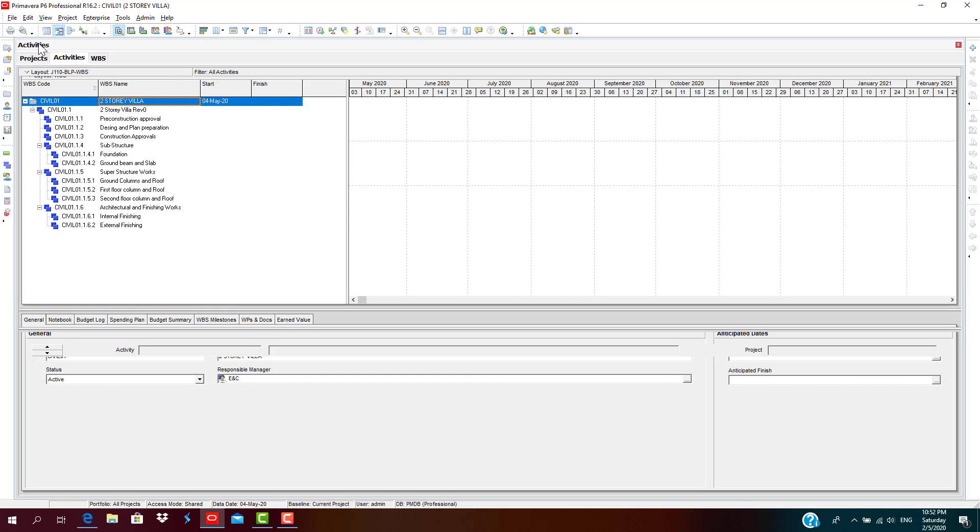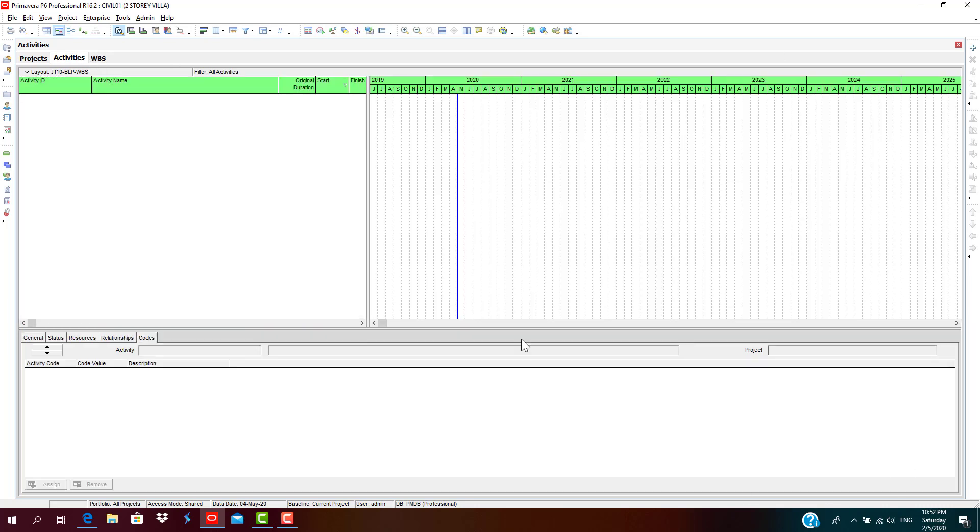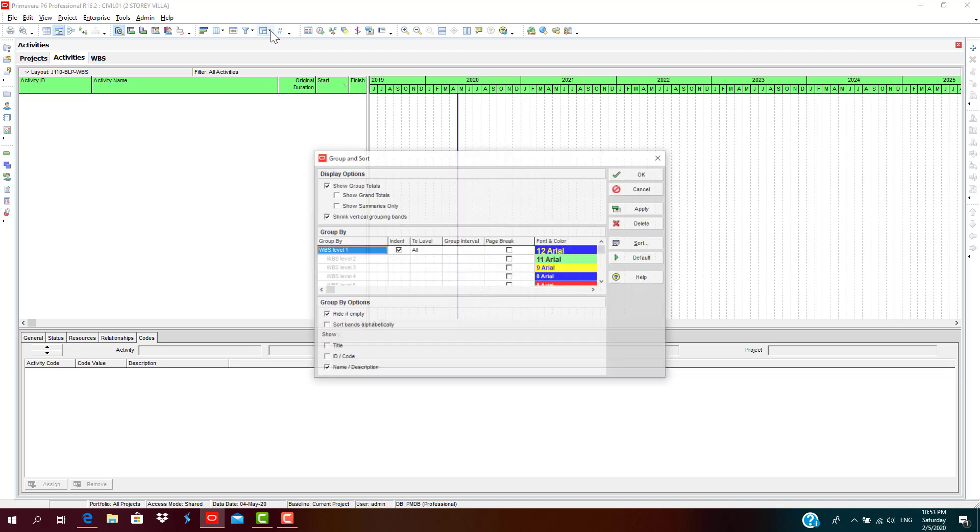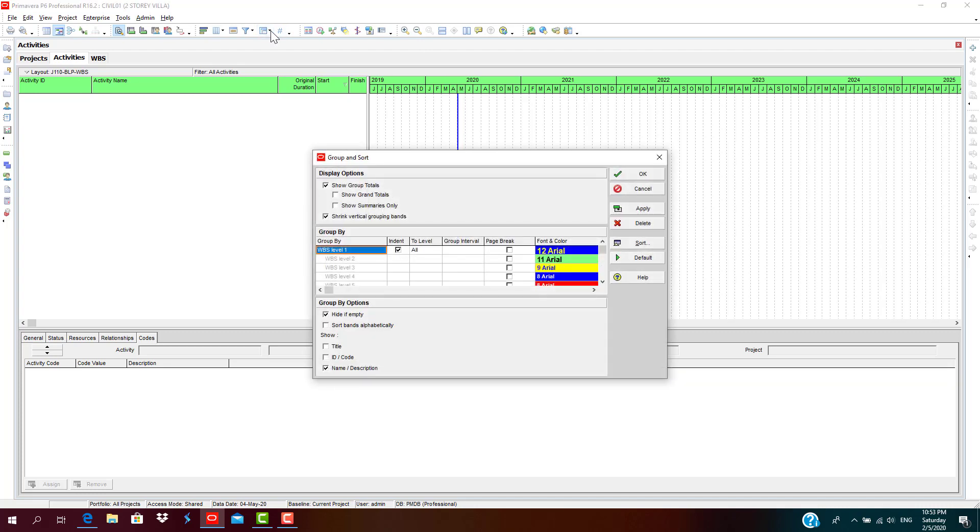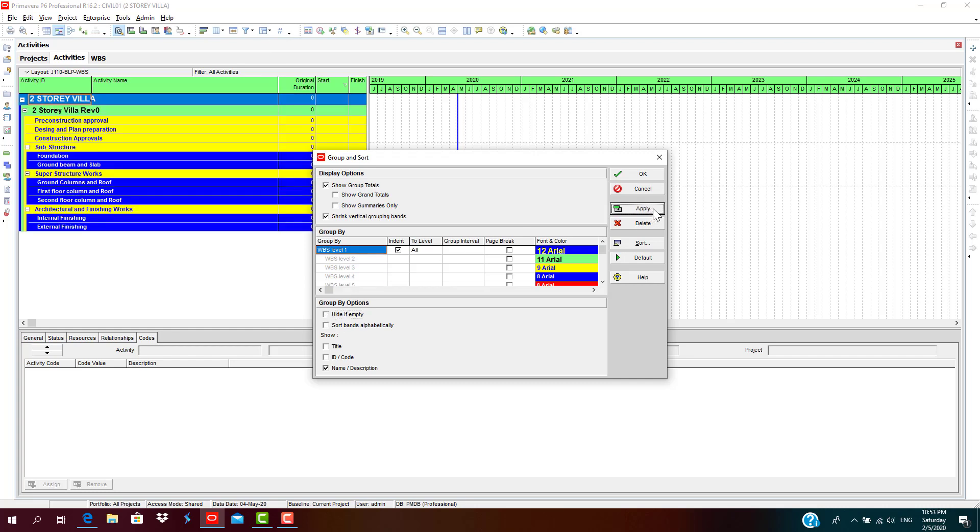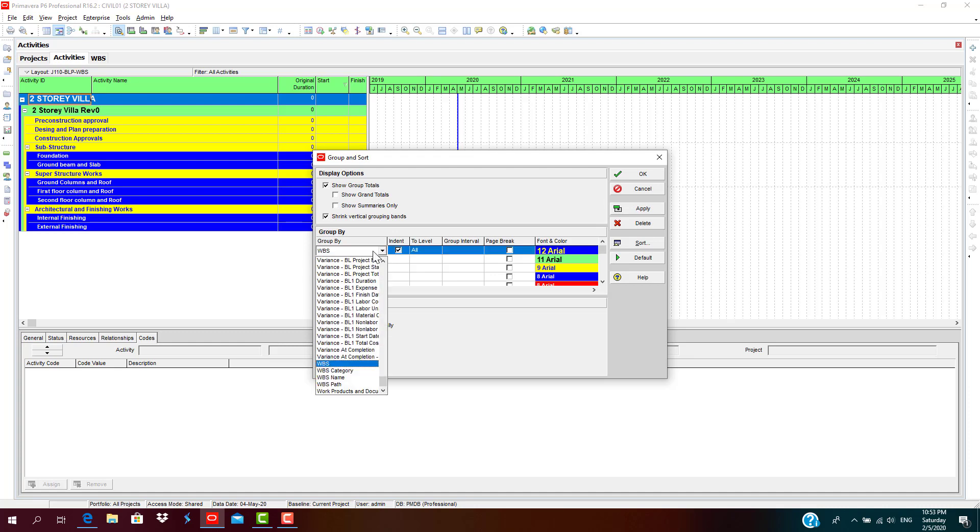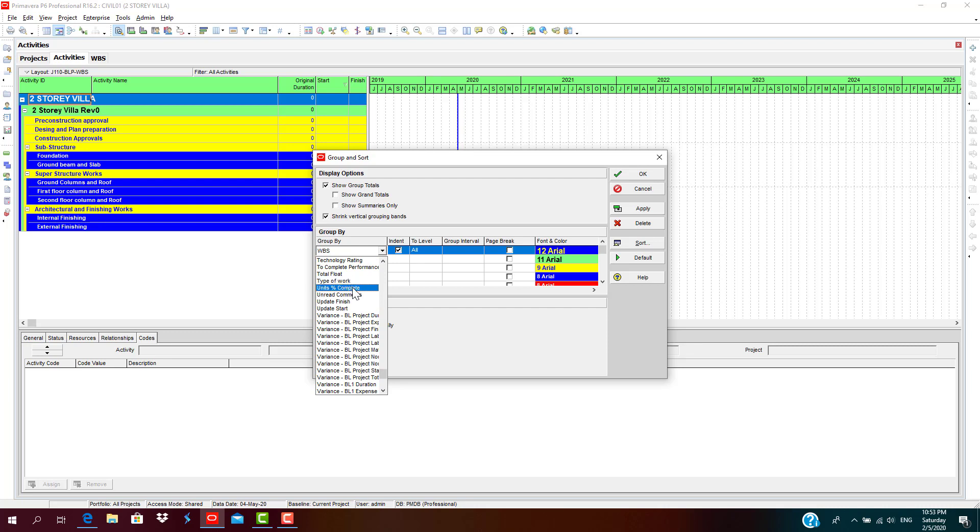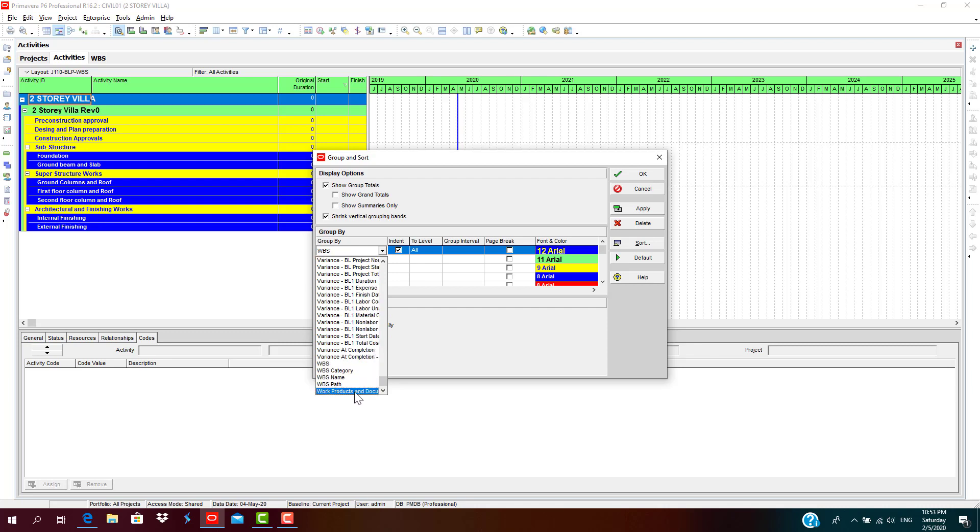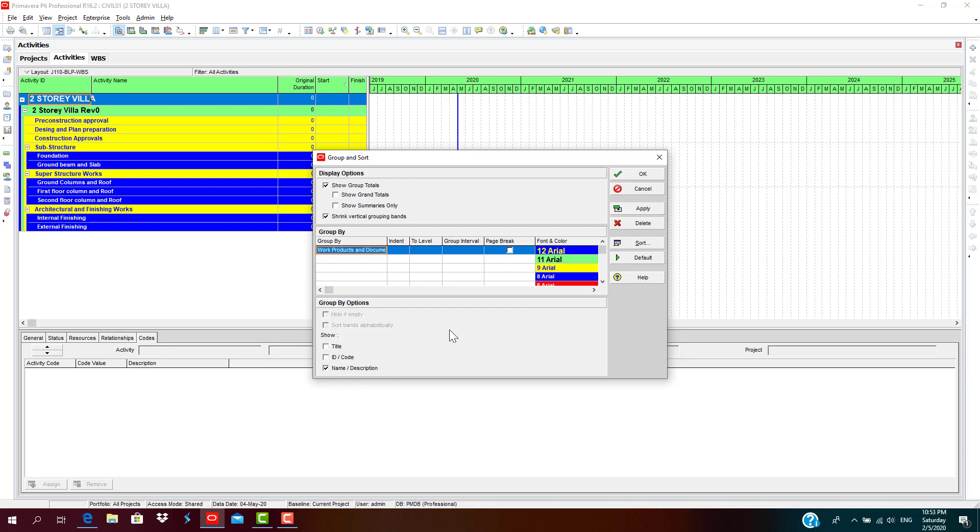When you go to the Activities, you are not seeing the WBS which you had created. You must check the layout, the layout which you have selected. Firstly, deselect Hide if Empty, then apply. Or else make sure this is not under different group, like suppose if it is under Work Productivity and Documentation grouping, then you cannot see.